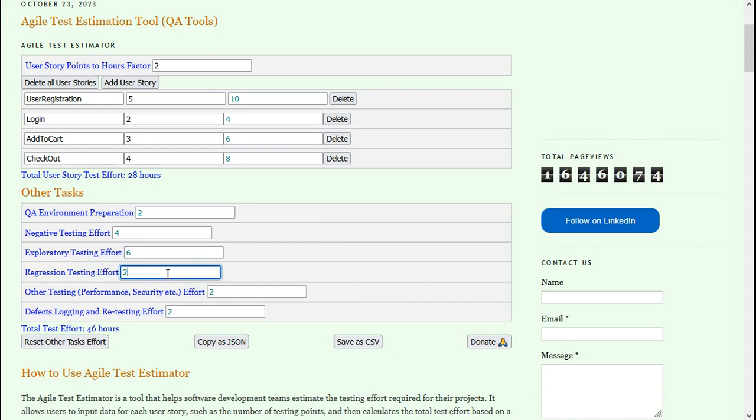Regression testing is to test whether the existing functionality does not break. This is going to take 8 hours. And there are other testing like performance testing, security testing, etc. This is going to take 5 hours.